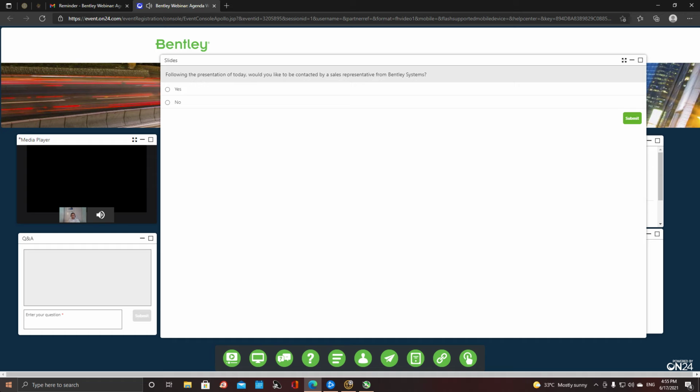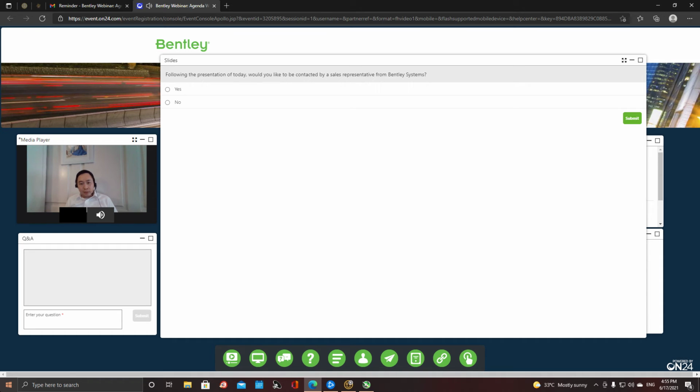So I'm going to answer the next one here: how do you do delay analysis? As I mentioned earlier, in Syncro we have the built-in CPM scheduling capability, so you can do critical path method calculation with your scheduled data. Like any other scheduling software, you can do float analysis to understand delay.